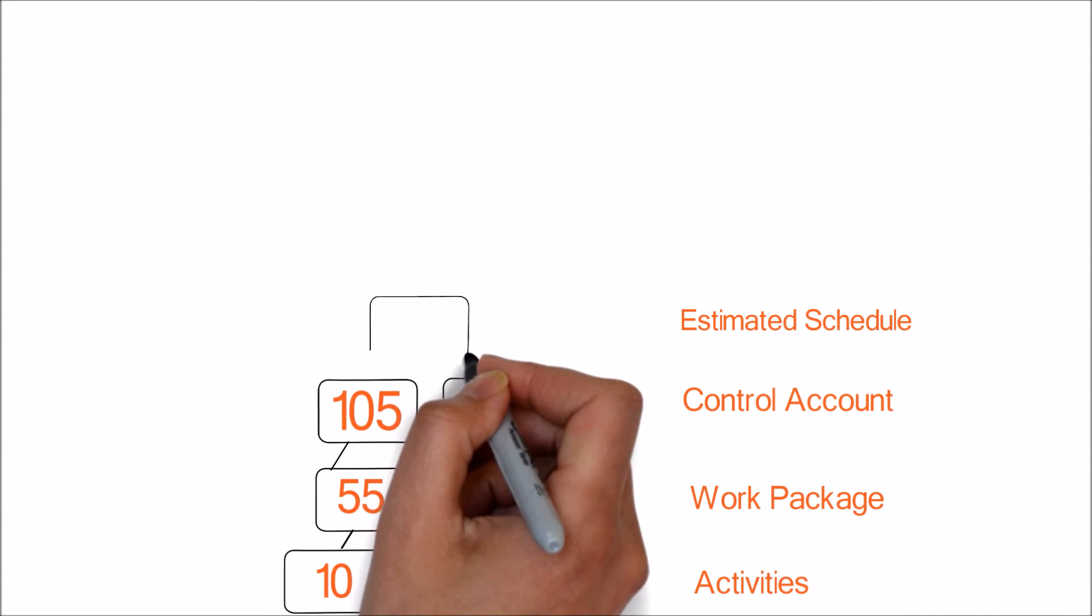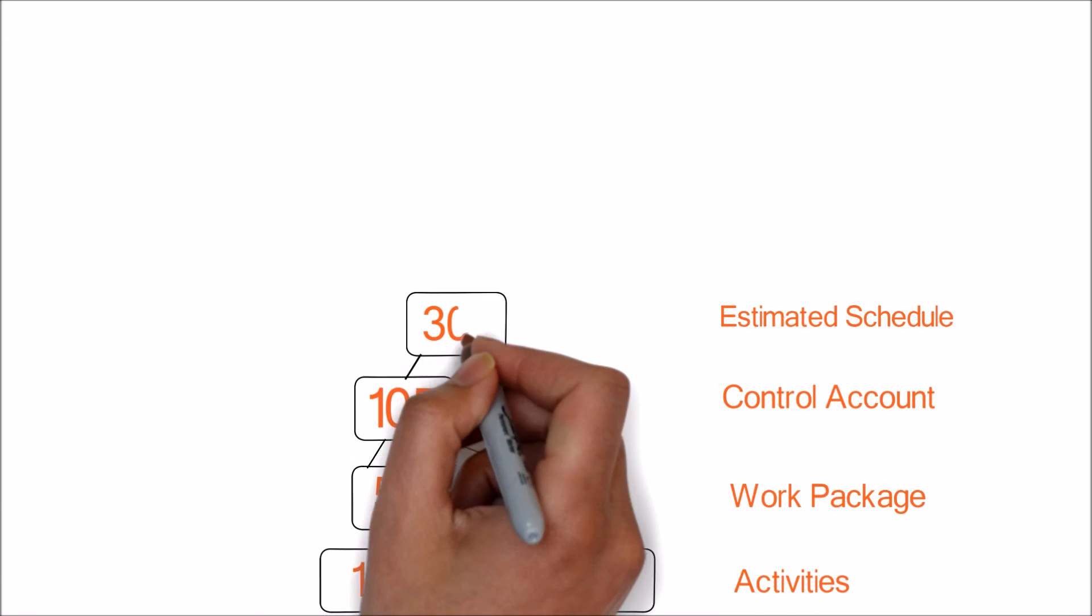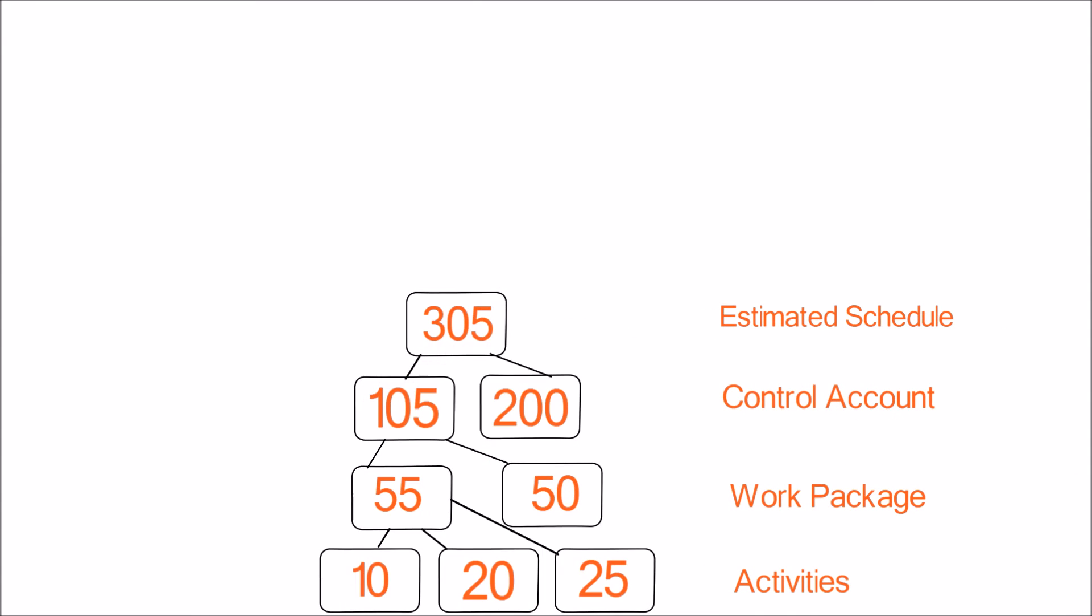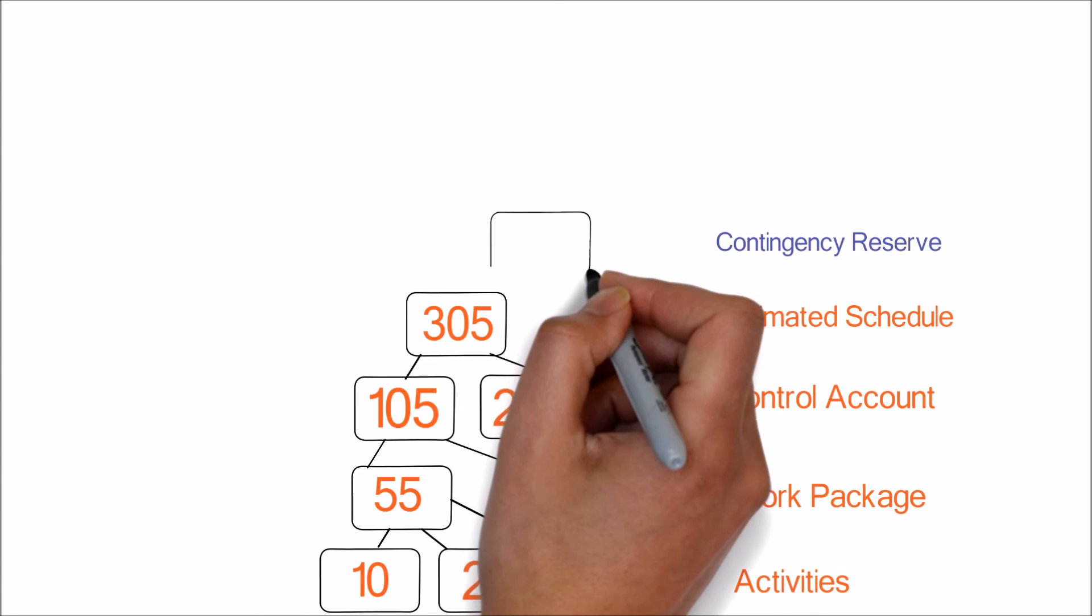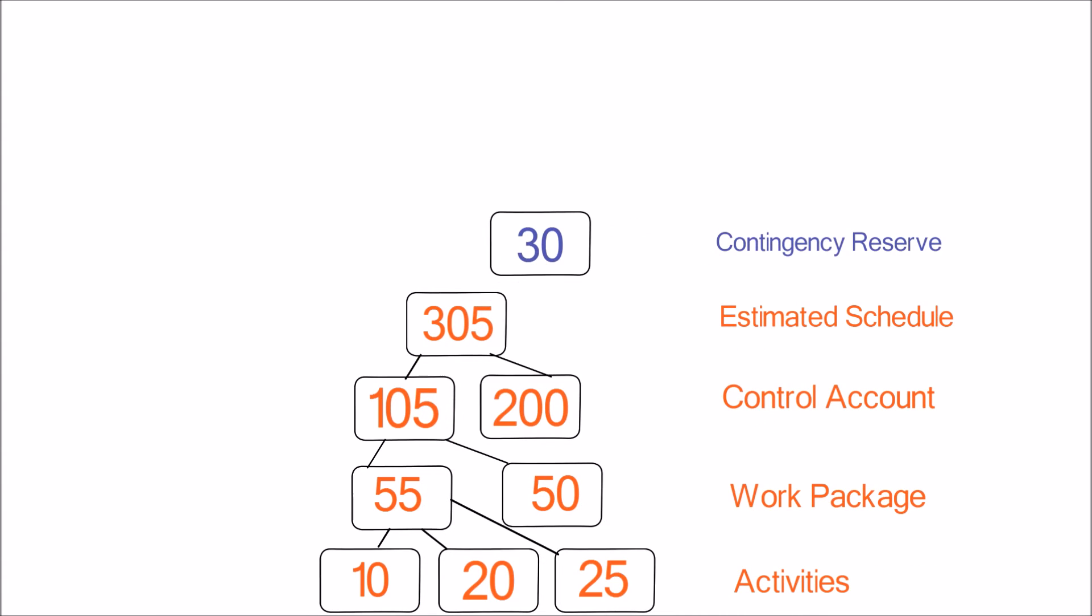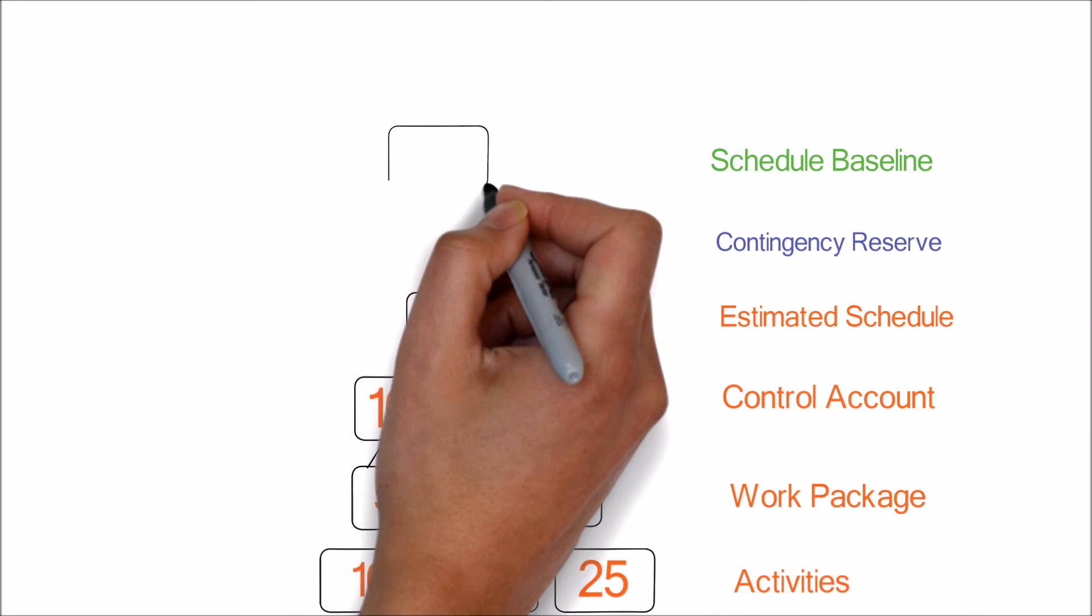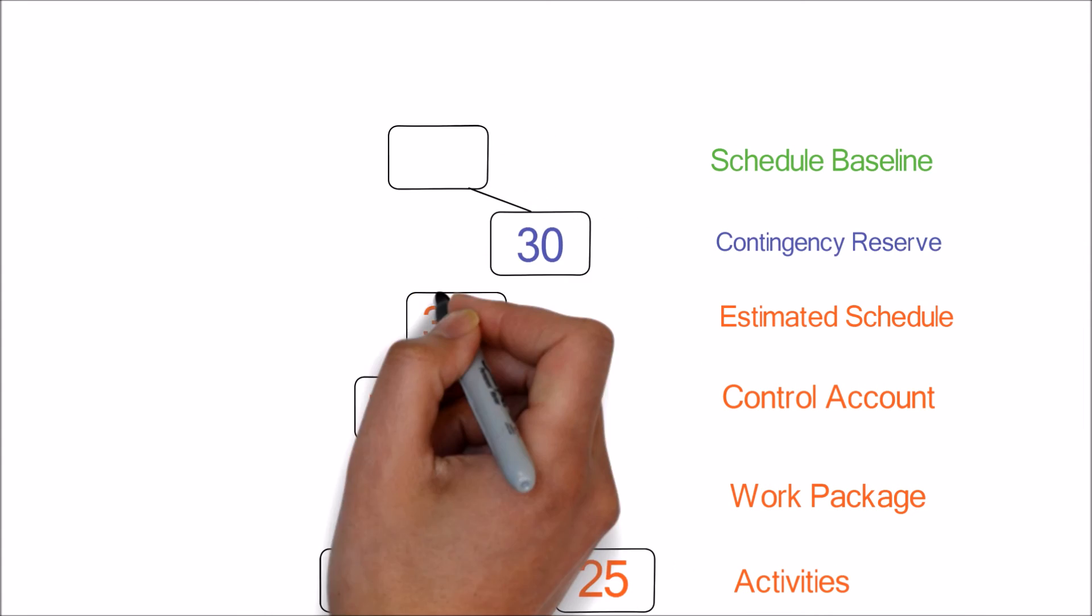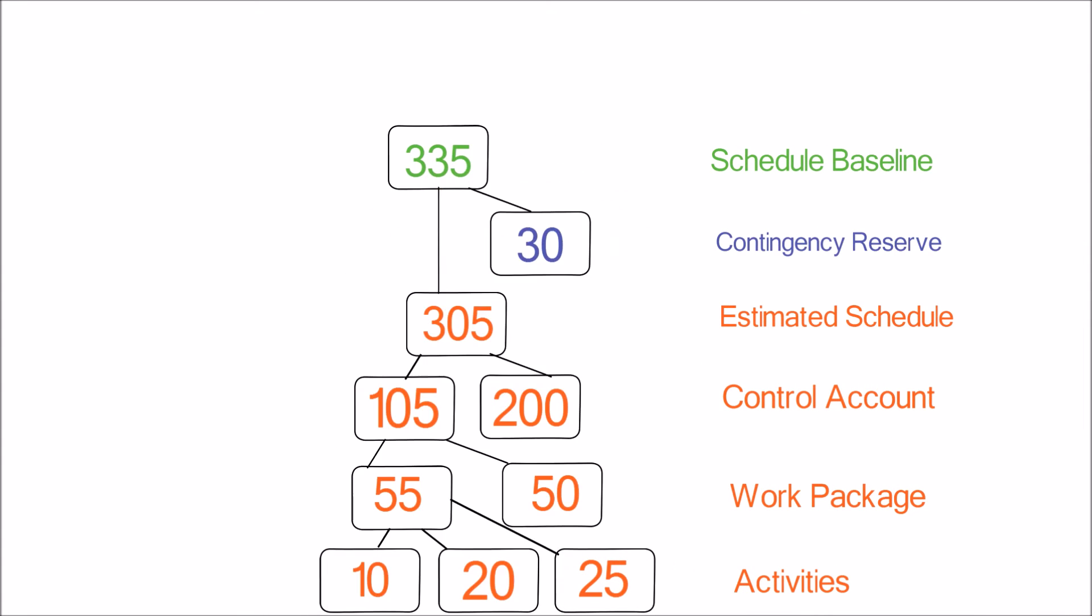Adding the data at control accounts level will give the schedule estimate of 305 days. Now let's add contingency reserve of 30 days which is based on risk calculation. Now adding schedule estimate with contingency reserve will give us the schedule baseline which is 335 days in this case.